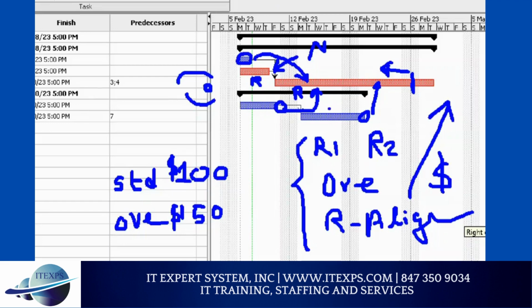Another thing you can do is, rather than waiting for this activity to complete and then start, maybe a portion of this activity can be started a little bit early, right? And maybe a portion of this activity can be divided and started early. That's called parallel start. This activity looks like an 8 days activity or 13 days activity, but it doesn't mean all of it has to be sequential. Maybe 7 days you can do and then the other activity can be sliced and create a parallel activity. If you do that, then you can go faster.